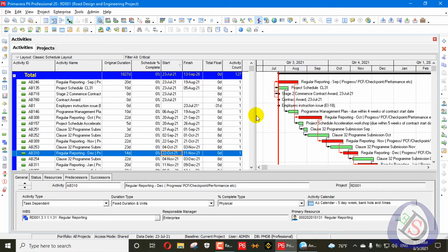the activities having a float greater than 0 up to 80 hours are also shown here, and these are counting 127 activities, and these are also near critical. So the difference between float and longest path can be shown from this method.